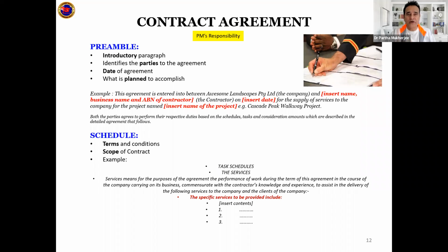Or if you're paying someone, you can say I can pay only in 30 days and not in 7 days and not in 15 days. These details are the terms and conditions which you give to the lawyer as a project manager, and based on, in costing we have seen a cash flow or an S curve. If you remember, we learned costing and the S curve. So you know your cash flow requirement, and you'll give these terms and conditions.